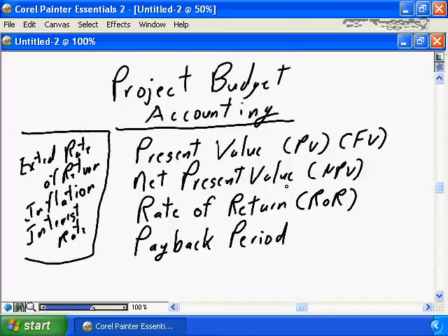What's the net present value? It is the present value of benefits minus the present value of the costs, i.e., what is the return on your project? If you take the full discounted future value of benefits minus the full discounted value of the cost for your project, what is the return? Again, is the company better off investing in your project, or is the money better off taking the funds from your project and putting in the bank and earning interest, which is equivalent to our rate of return? Is this a good investment decision for our company or not?